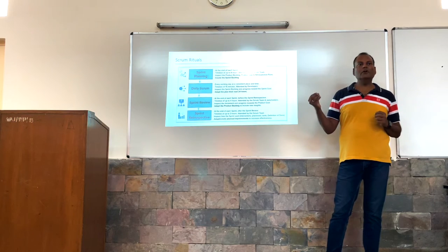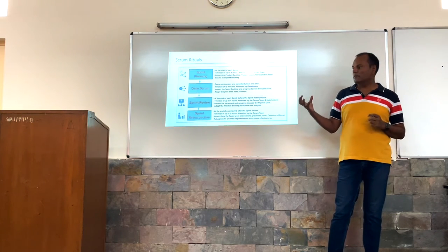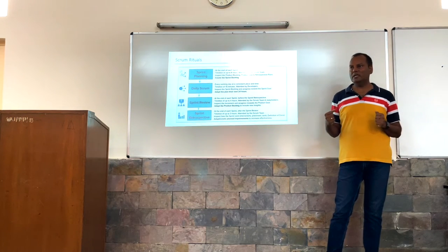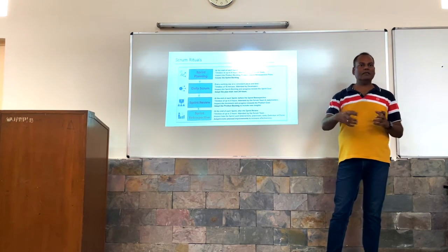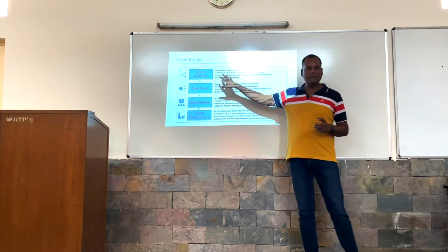What is the story point? They also calculate a story point, the size of work. Because if a team has a capacity of working 200 story points in 50 days, they cannot take on work of more than 200 story points.